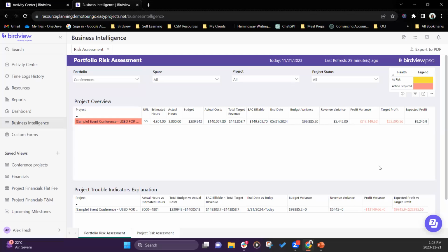So ideally, when it comes to revenue variance, profit variance, and budget variance, in an ideal state we want it to be 0. However, reality always deviates from the ideal situation, so there could be some variances. This is why if the budget variance is higher than 0, we are in good standing. If the budget variance is less than 0, that means an action is required on the actual side of things.